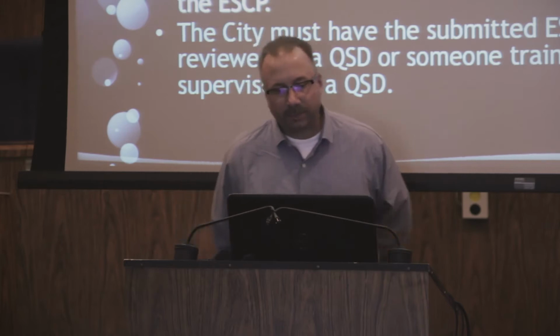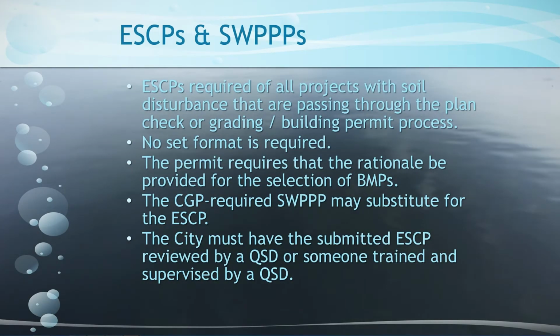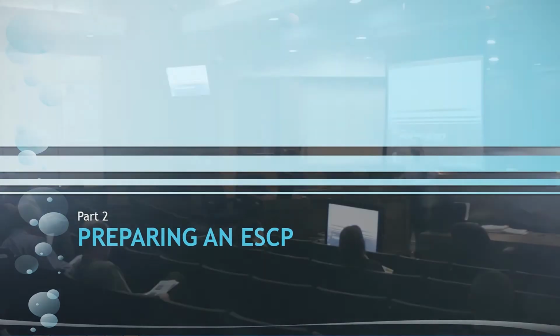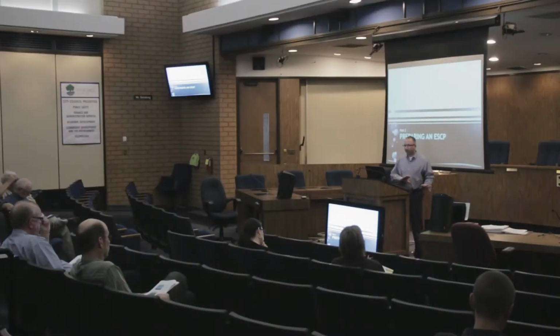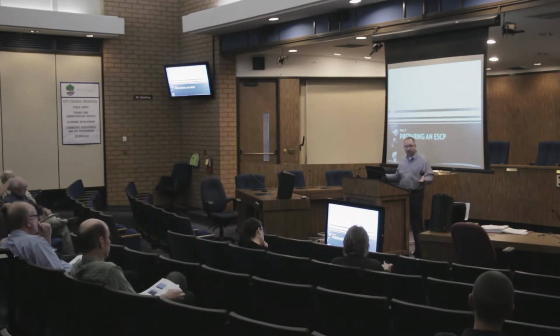And the city must have the submitted erosion and sediment control plan, or that SWIP, reviewed by a QSD, someone on their staff that's a QSD, or it could be a staff member who's working under the QSD who's been trained and is supervised by that person. All right, so that's kind of the background on why the city's requiring these things. And the bottom line is that's a permit requirement. The city does not have a choice, and in order to meet its permit requirements, it has to require these.